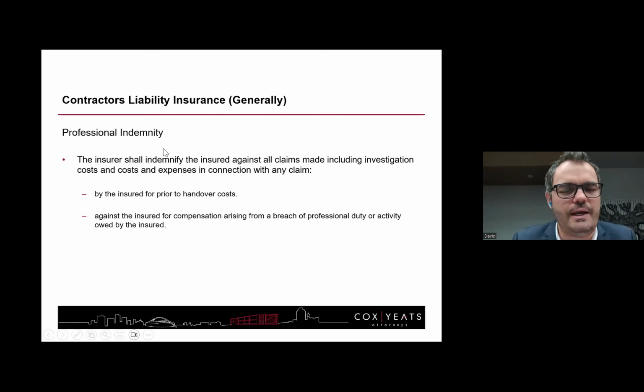The duration, Adrian, that's a good question. So for example, the Section 31s can take, sure, what's my fastest Section 31? I think the fastest I've seen the Department of Labour close out a Section 31 is around about 10 weeks. That's just the preliminary investigation. The Section 32 investigation, I've seen them take up to 5 years. That's the inquiry.